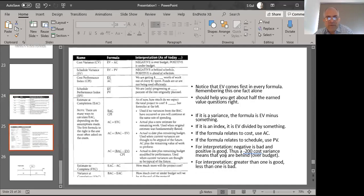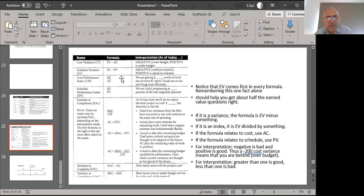The key EVM formulas are: Cost Variance (CV) = EV minus AC; Schedule Variance (SV) = EV minus PV; Cost Performance Index (CPI) = EV divided by AC; Schedule Performance Index (SPI) = EV divided by PV. Estimate at Completion (EAC) and Estimate to Complete (ETC) each have their own formulas as well.